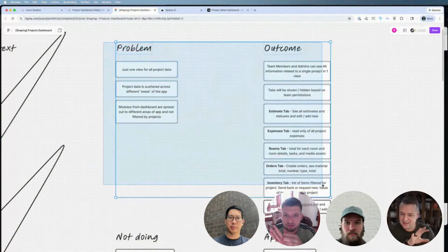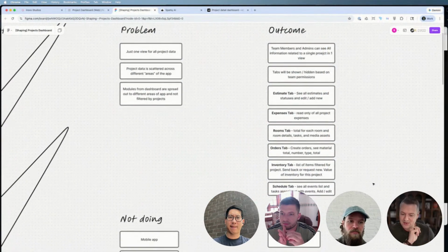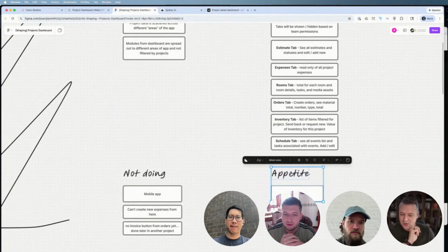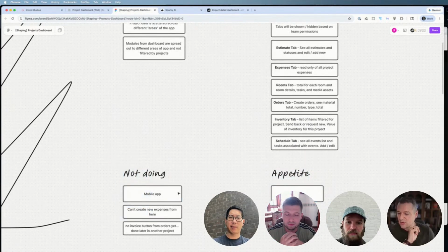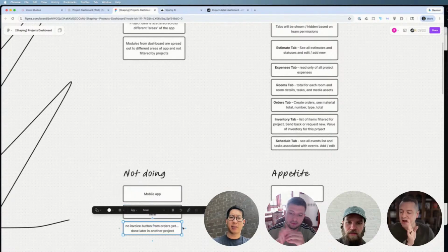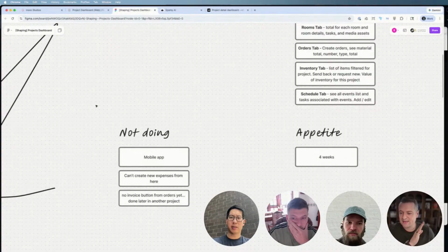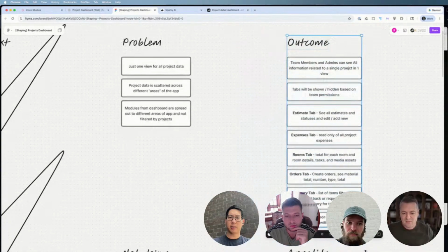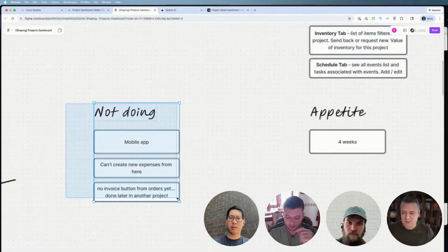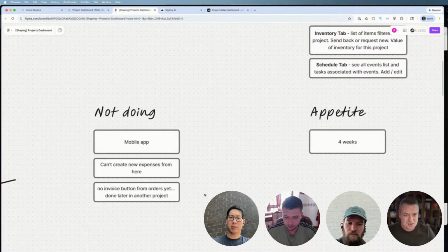So this took probably an hour and a half. We knew it was going to be 4 weeks was the appetite, and things we said we weren't doing, like a mobile app, which we had talked about with the client and then specifically mentioned we weren't doing. This is a great thing that keeps coming up. We tend to talk about a lot of things with the client, and what's helpful with the not doing is to show them what we're doing above, in the outcome, but then if we talked about it, we typically put it on the not doing list. So they're super clear that we are not doing this thing, because sometimes it gets lost.